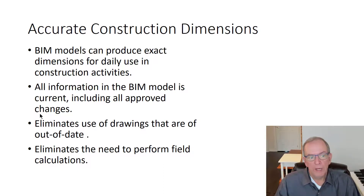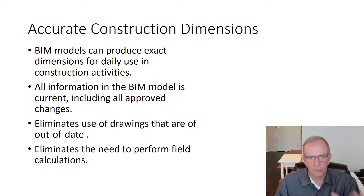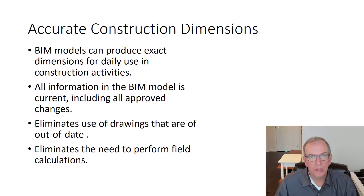It also ensures proper integration with productivity software so we can ensure we've got the most current drawing and the model is up to date. This goes back to what we talked about in the last lecture — dynamic documents versus static documents. Dynamic means as you make changes, everybody you want to see them can see them right away. They're not looking at last month's drawing when things have radically changed and now they're doing the work the wrong way. I can't tell you how many billions — if not trillions — of dollars have been wasted in construction through rework from poor management of drawing dates and revisions.